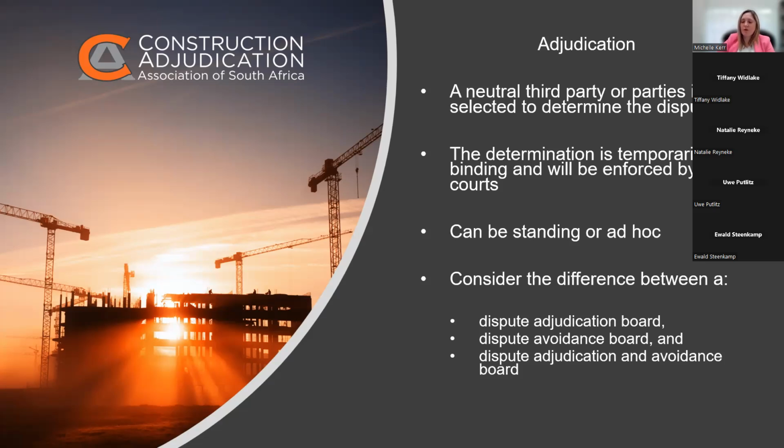So you'll see that kind of process set out in, let's say, the special conditions for the SANRAL contracts, where they've taken the normal FIDIC adjudication board, where a dispute is referred to the adjudication board and they make a decision, and they've inserted a provision saying that the parties, if they jointly agree, can ask the DAB to provide an opinion. And it's not binding.